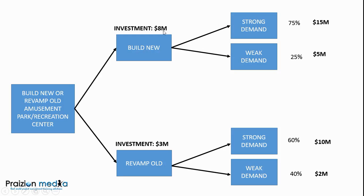Now we need to go further than this. We also need to look at the profit. We've got the investment and we've got the revenue; we need to find the profit for the strong demand branch. So we're going to subtract the $8 million from the $15 million and multiply by 75%, or 0.75. Then we're going to do the same for the weak demand — find what the profit would be: 5 minus 8, which is minus 3, times 25%. Then we add those two numbers together. And we'll do the same for the revamp option.